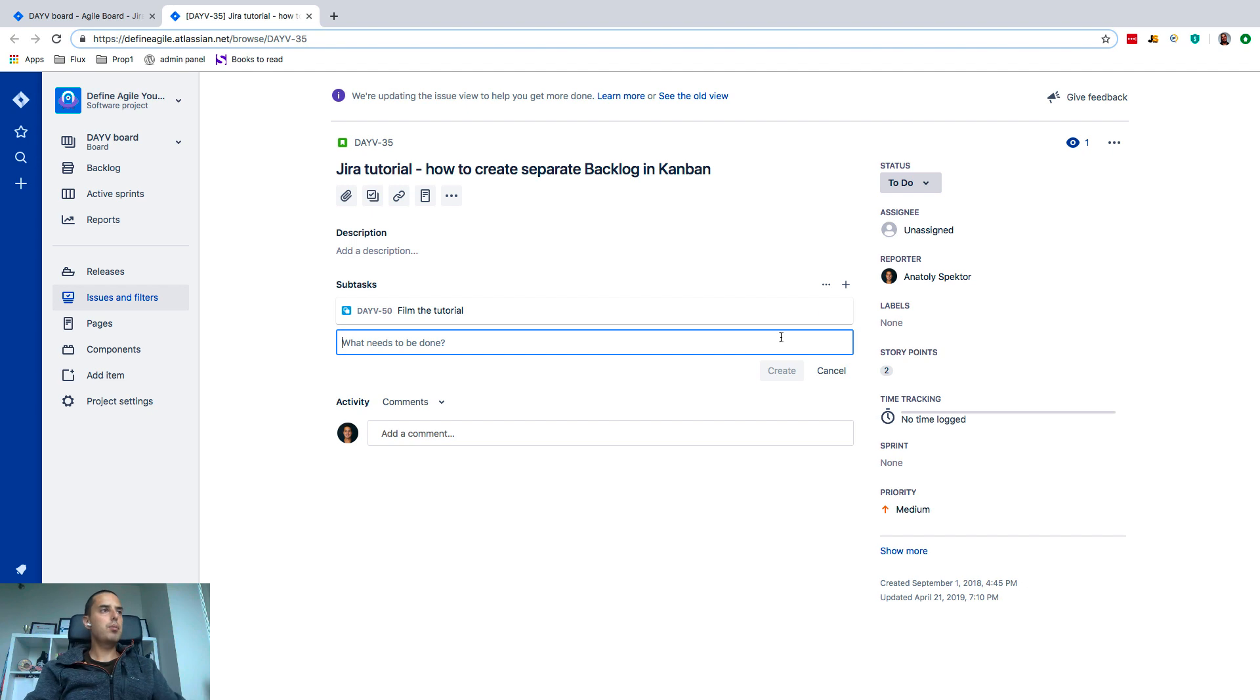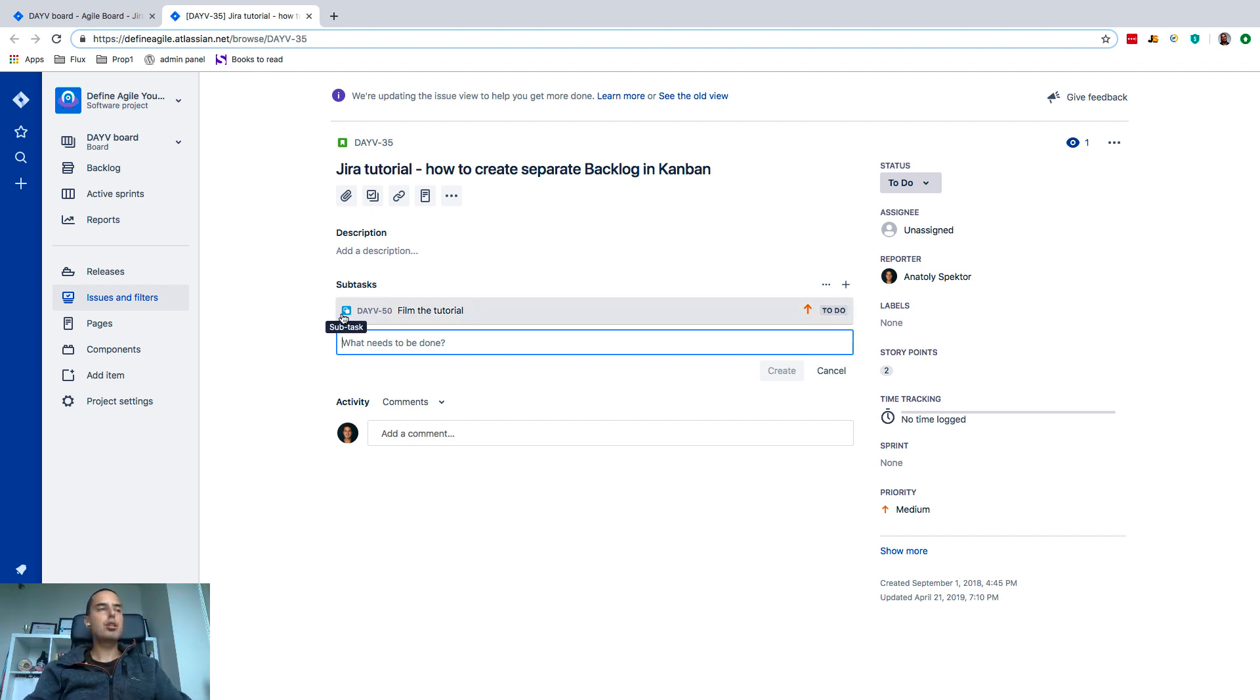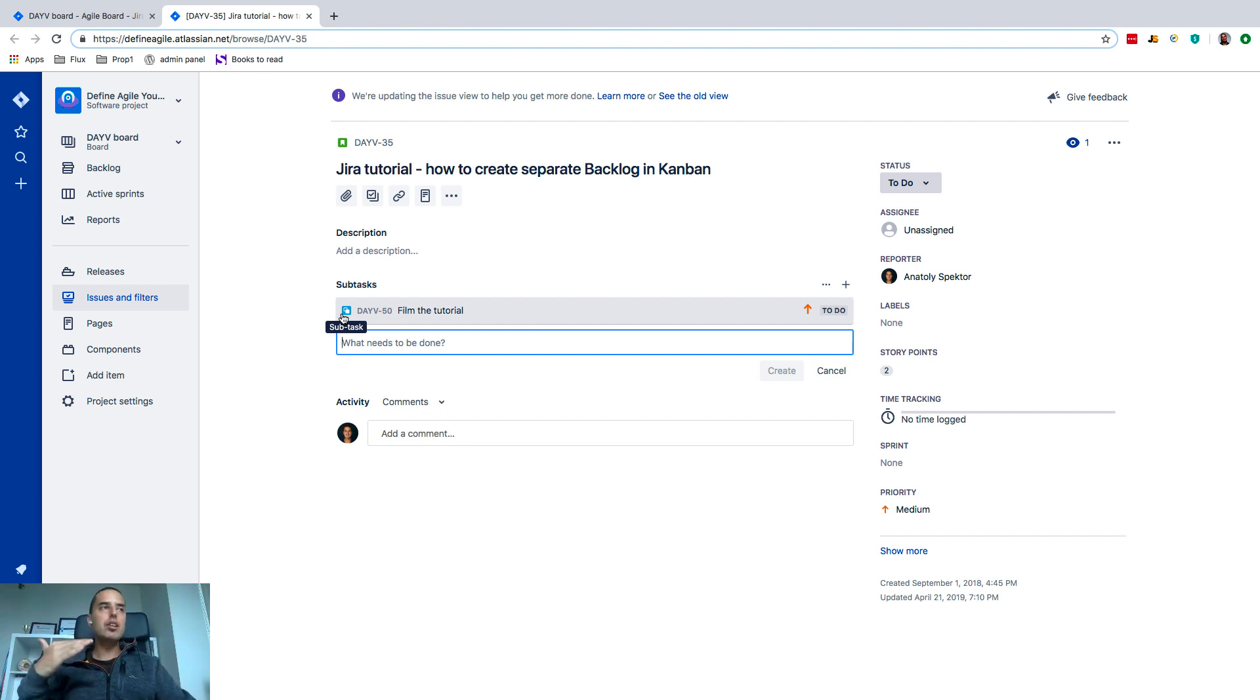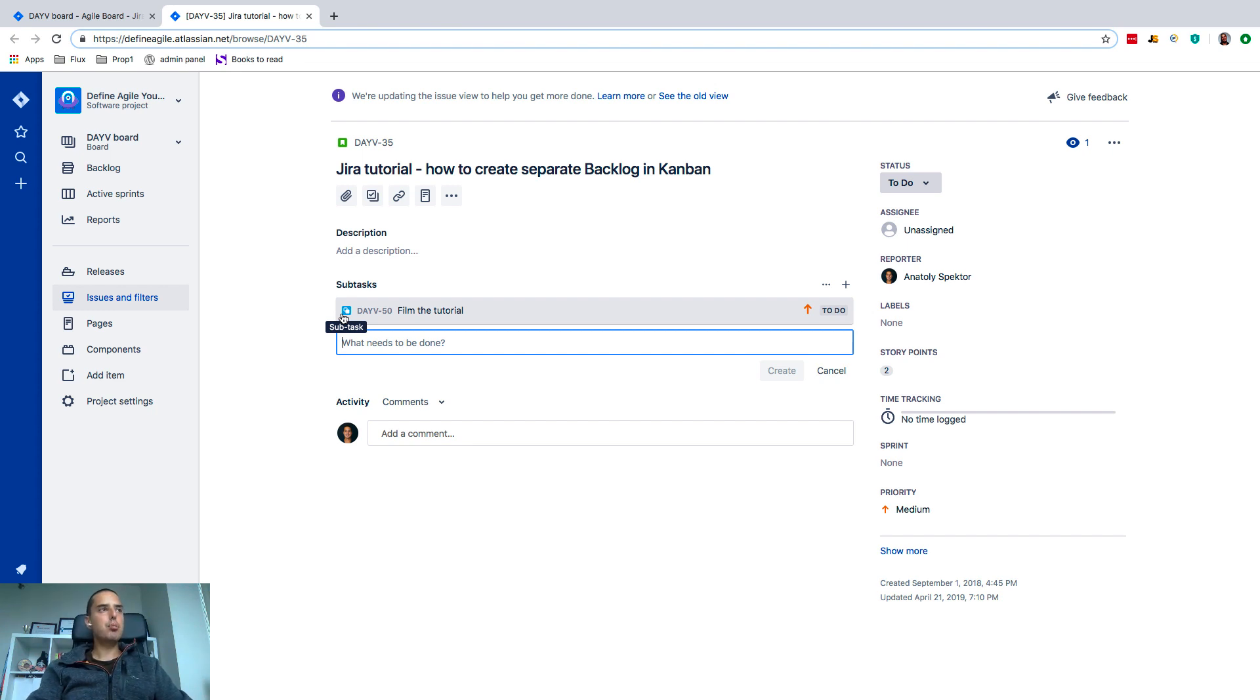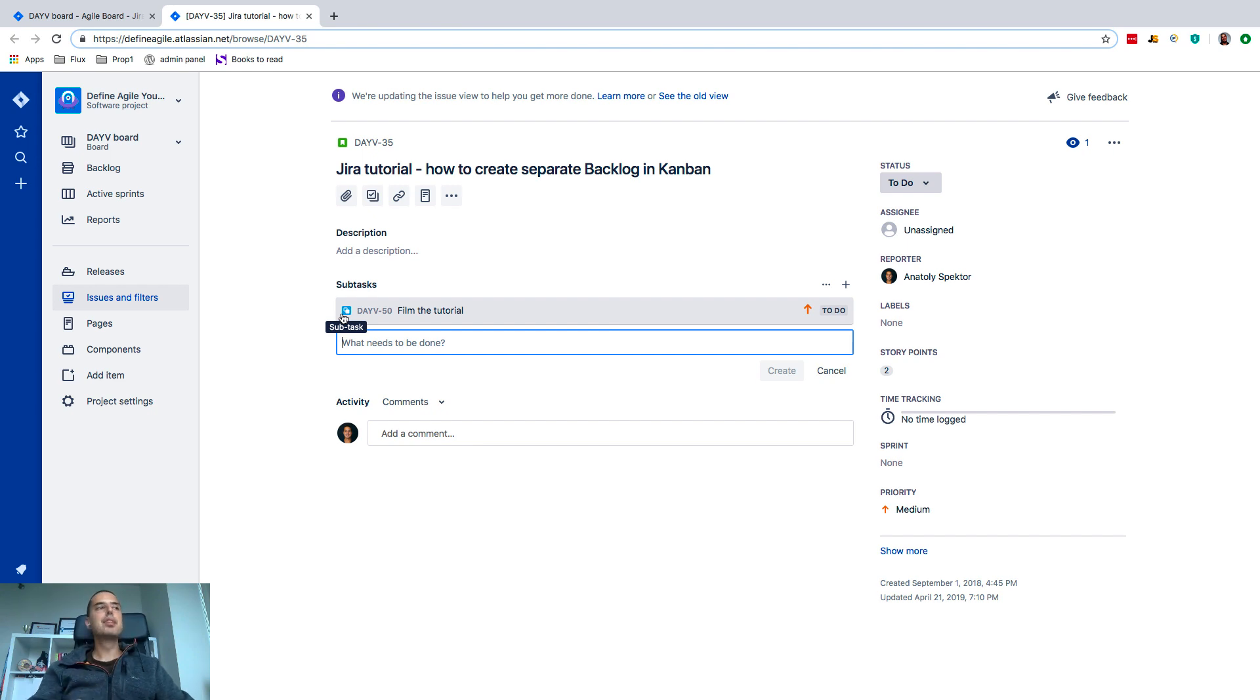And as you might see, it would create a task which will be... the issue type would be a subtask. So actually tasks can go underneath stories as well, which is important to remember. So this is one of the differences: you cannot have sub-stories, you can only have subtasks. So this is one of the differences.